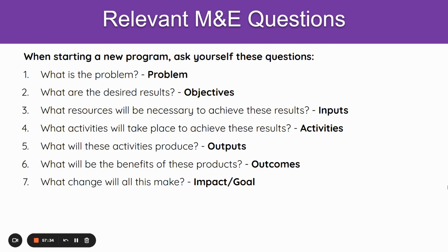Process evaluation looks at the implementation, the activities and the resources we put in the project, and the steps we took: how well we used resources to achieve the project results, how well we implemented activities, how well we used our time and our resources to achieve the project. That's process evaluation. We also have outcomes evaluation. Outcomes evaluation tries to assess the changes within the beneficiaries, which has to do with the benefit of the project or the benefit of the particular intervention.